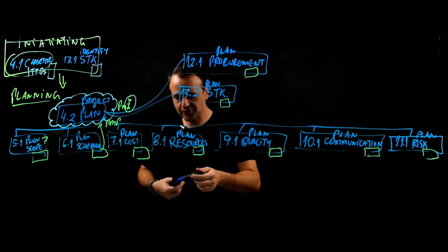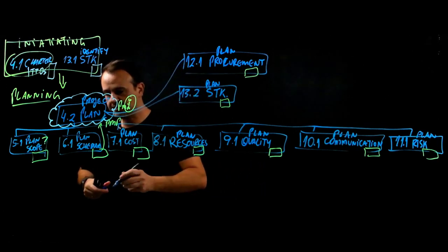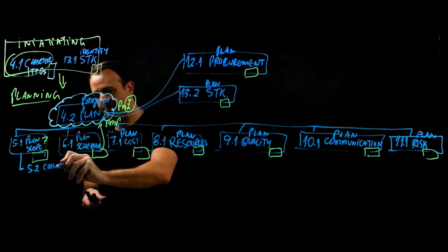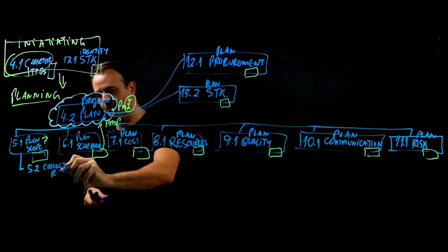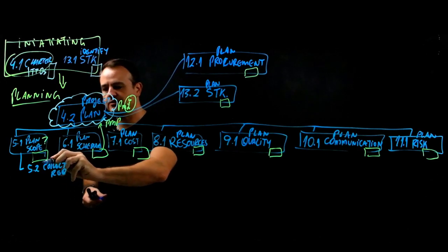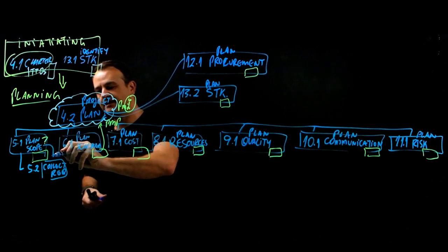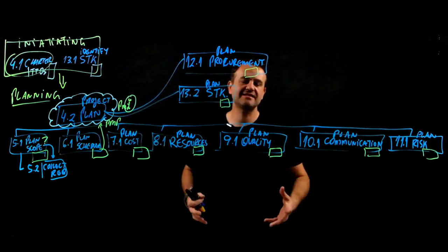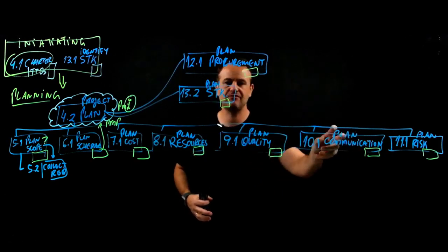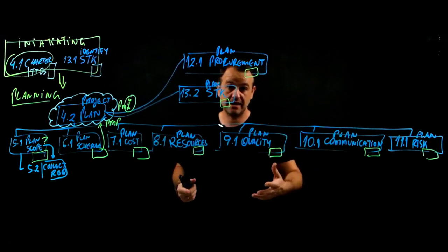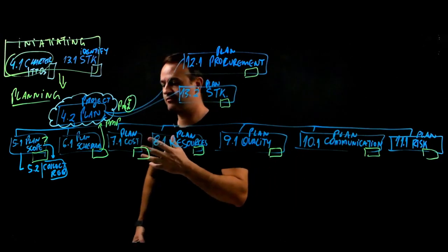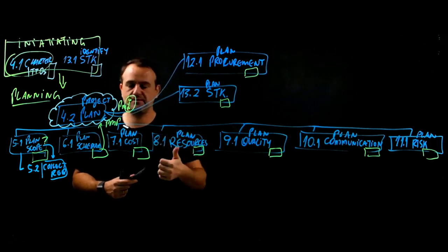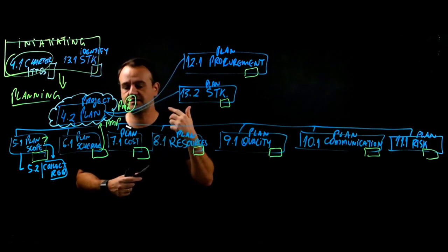Let's move to the next processes. So the next step here is 5.2. We are going to collect requirements. How are you going to collect requirements? You are going to collect requirements based on the definitions you had in the scope management plan. That's why it's necessary that we create a plan for every different area so that we select the approach, we select who is responsible for that, we identify the tools. You can collect requirements using brainstorming, for example, using process maps, prototyping.